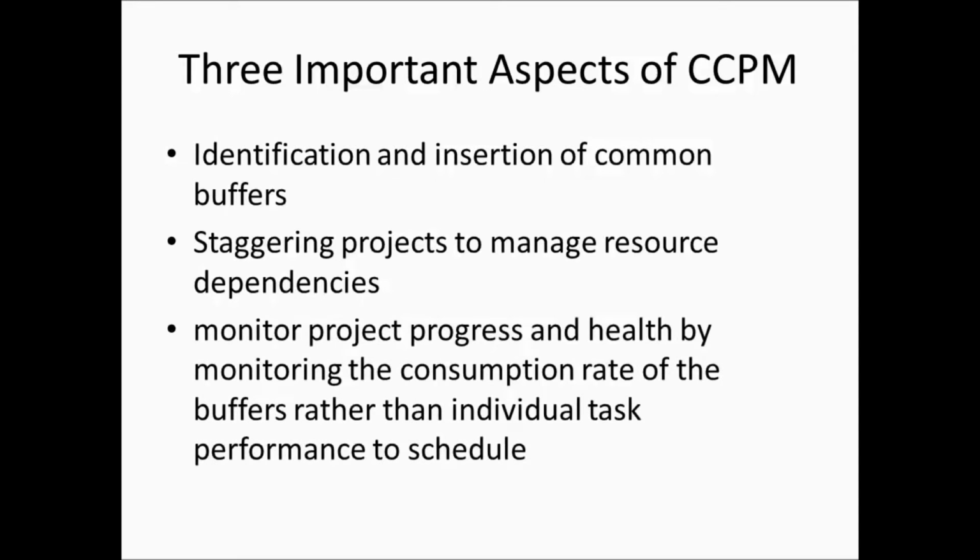Now the third aspect of Goldratt's theory is to monitor project progress and health by monitoring the consumption rate of the buffer rather than the individual task performance to schedule. And we will cover this third aspect a little later in this module.